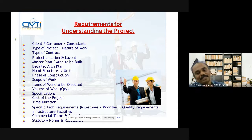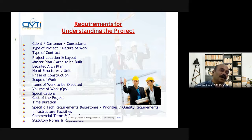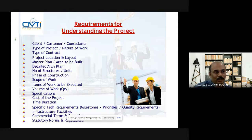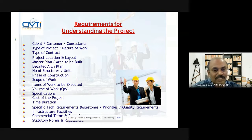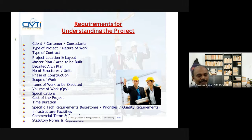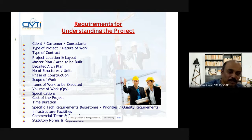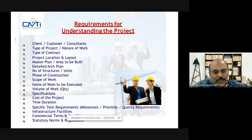Next is specifications — you should know about the specification of the work. For an international project like an airport, a lot of materials must come from international locations — aero bridges, for example, come from Germany or other countries. You should know the specification: from which country the materials are coming, whether you are using a brick, solid block, or lightweight block — that is the material specification decided by the architects. You have to read the architectural drawings and understand the specification: what material we are using, where it is coming from, and how it has to be tested before it goes for construction.